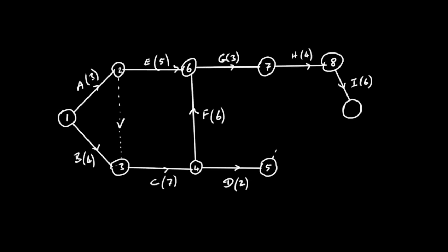So really what we would have to do is put a dummy activity up along here. Now the problem here is, well, not so much a problem, but we have 2 dummy activities. Really, what I could do is just take this node here and attach it here, if you like, combine these 2 nodes so that D would go directly up along this way. So that's what I think I might do.